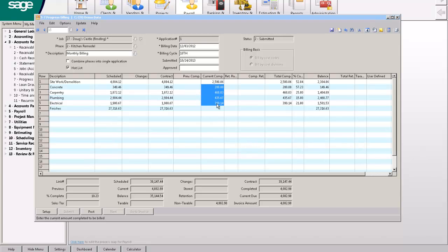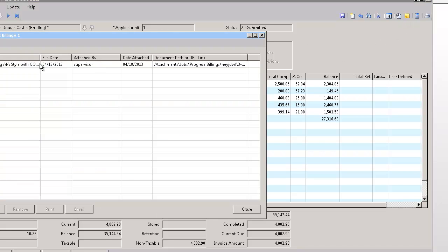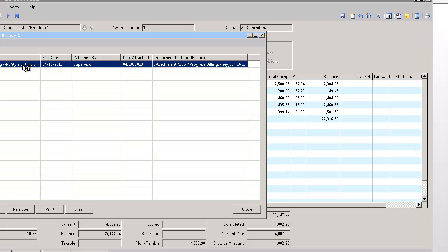And then you have a choice when you do that bill each month. You can either enter in what you want to bill, or you can enter in the percent that is complete. I have clients that do it both ways. A couple clients like round percentages, and some of my clients like round dollars. So it's up to you, but either way, this will produce the billing. I just happen to have a sample here, and this is one of the samples. There's quite a few of these actually.